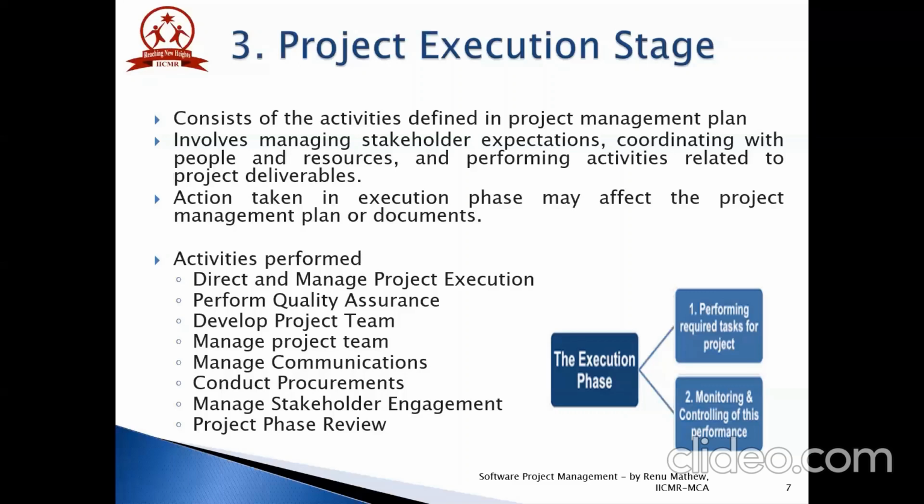Developing project team is also a part of the project execution phase. The main purpose is to improve the overall performance of team members. This stage must start early on the project. The inputs in the develop project team process include human resource management plan, project staff assignments, and resource calendars. Outputs of this process include team performance assessments and enterprise environmental factors updates.